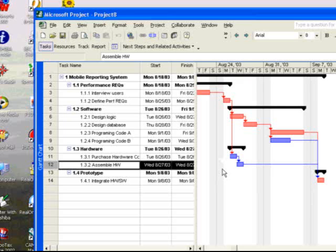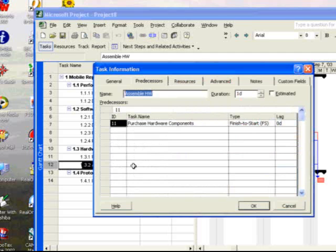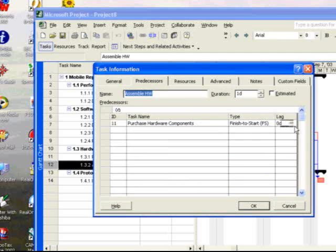This would be your classic finish-to-start lag. So how would I introduce this into the schedule? Well, there are a number of different ways. Perhaps the simplest is to double-click the task, purchase, and then simply put in three days into the lag.